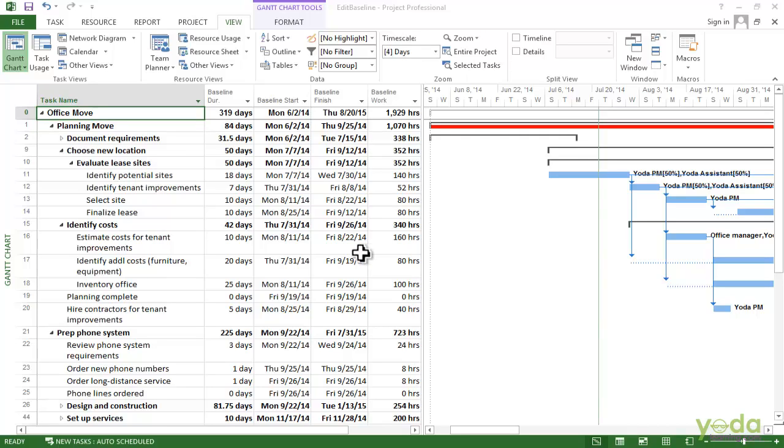Every so often you need to edit a baseline after you save it. For example, the stakeholders might approve some additional scope and you need to add that to the baseline. Or you might need to change baseline values that weren't correct. You can resave parts of the baseline to see the new target values while still keeping track of any existing variance from the plan. Before you have actual values, you can just override the baseline.